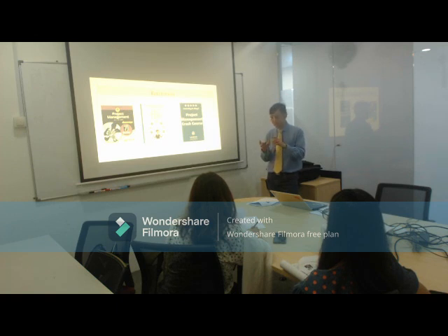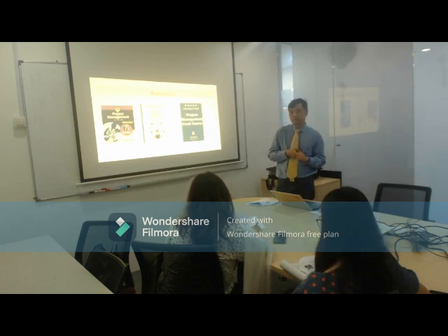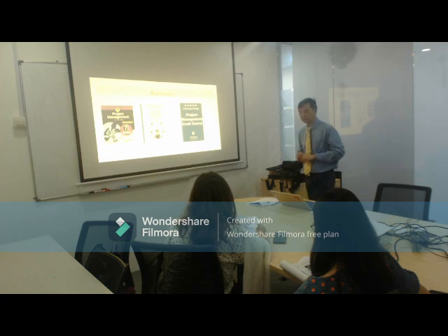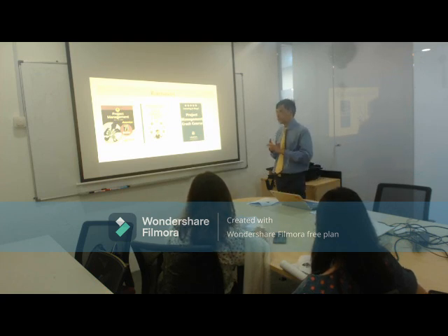When we go for the initiation phase, for example, one of the main things is something called a project initiation memo, a PIM. The PIM is important. Why? It tells you who will be the project manager, what the resources are, and what the objective of the project is. So that's for project initiation.